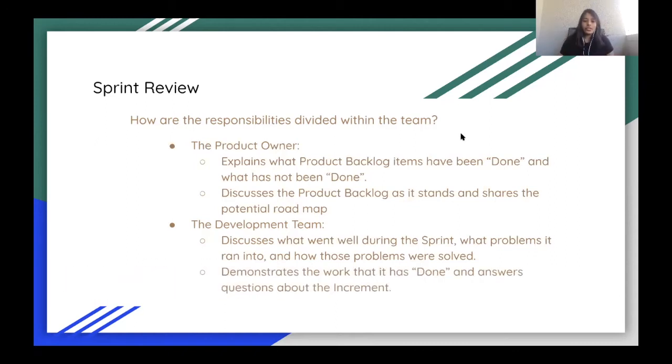And of course, the most important part for the dev team in this meeting is to demonstrate and to present their work. It is not the product owner who presents in this meeting, it is the developers who present their own work.